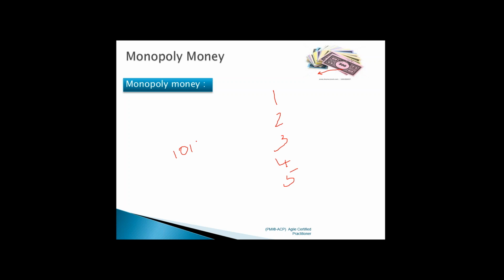For $10,000, how much do you intend to spend on each of the requirements? I might say, hey, I want to spend $8,000 on this third requirement. What does that mean? You're giving more emphasis to requirement 3. You're prioritizing it in a way.